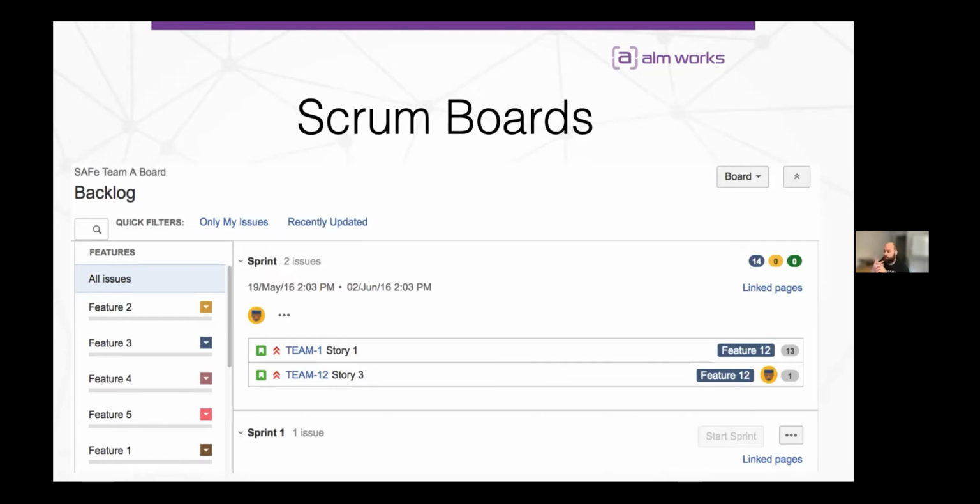It's not really designed to give you a good overview of what your backlog looks like when you have multiple dimensions that you have to prioritize across, right? And when we talk about different metrics that you could use, it's not just story points, but you'll do business value and various other things like weighted shortest job first. You need a different way to track those things because this interface is very specialized and good for what it's doing right now. But when you have to manage and keep track across a portfolio of items, it's not good enough, to be very frank. But that's a limitation that we know about. It's good to know where the edges are of what you can get out of Jira.